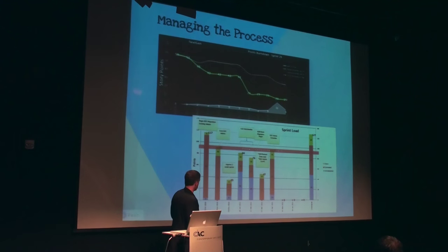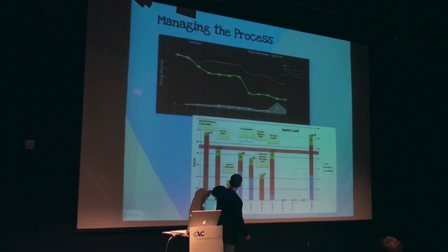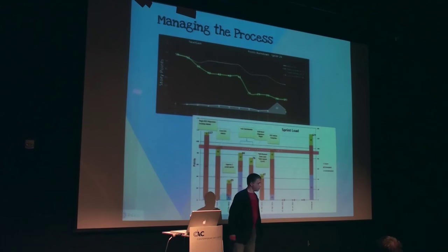Many of them have not been estimated by the team. So as things get estimated, they may get pushed back. We thought they were important, but as time went on, we pushed them back. These red lines here show things that have been estimated, and the blue shows things that are not estimated. We always keep this idea of churn in there because things are changing throughout that period of time.